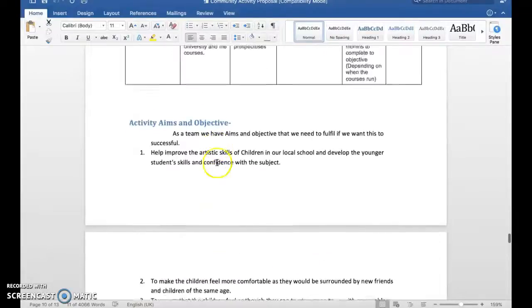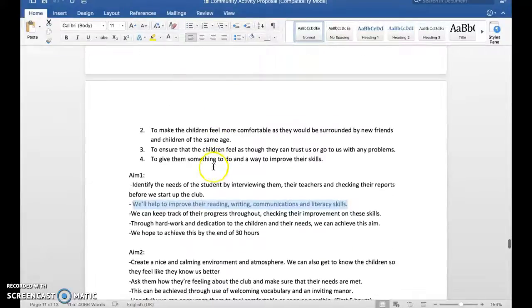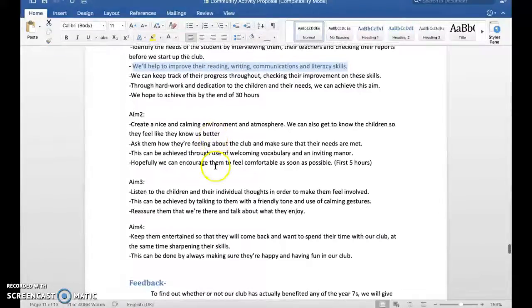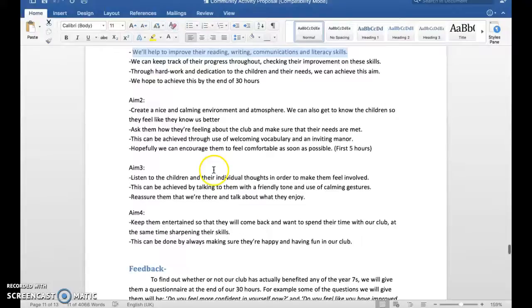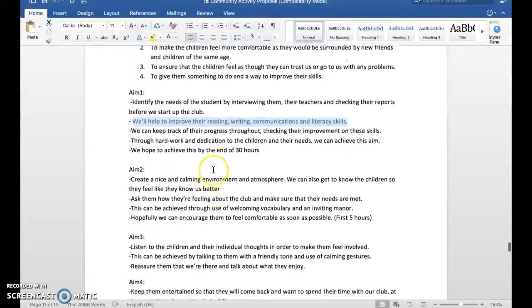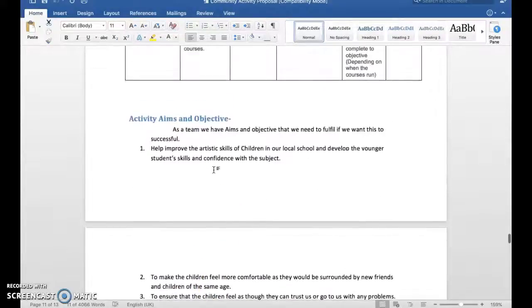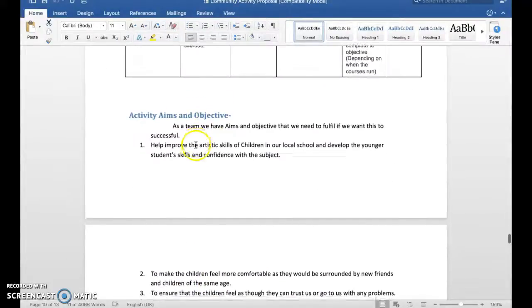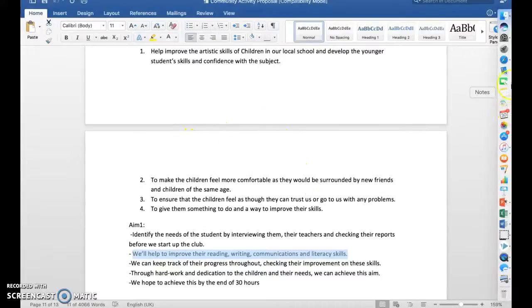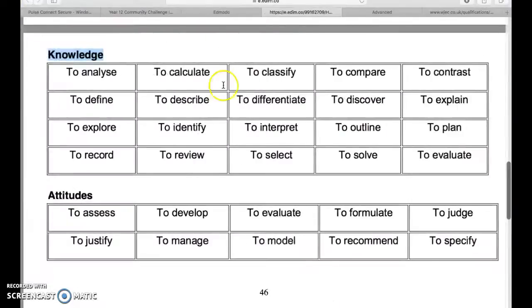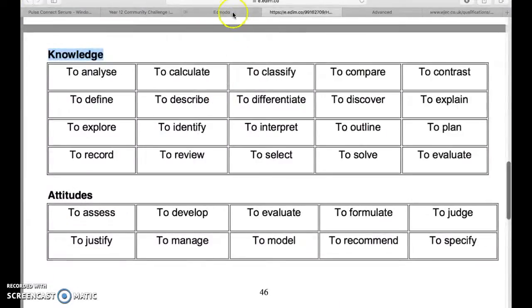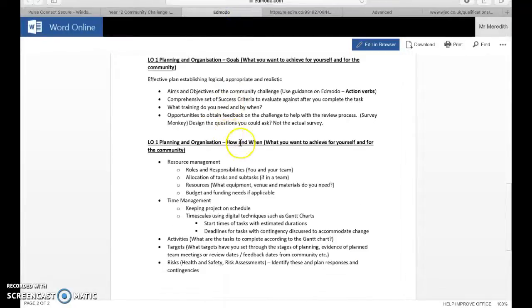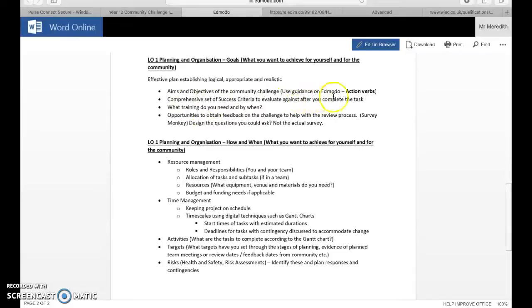You've got another aim: you will help to improve their reading, writing, communication, and literacy skills. Well that's pretty big, that's a big aim. That's meant to be an objective. You should break that down into smaller pieces to make that aim overall. This was a good community activity proposal but nobody really got to terms with the aims and objectives.